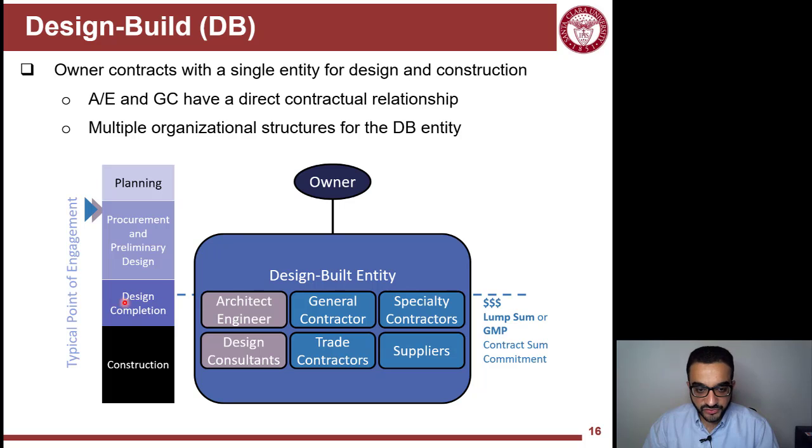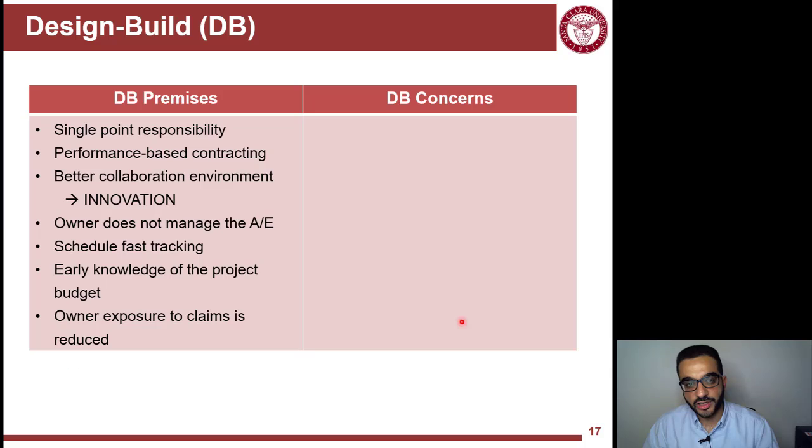And here, at some point, before even 100% design complete, you can get a commitment from that design build entity on how much the project will be. So you get a lump sum or a guaranteed maximum price commitment from the design builder. Good things about design build